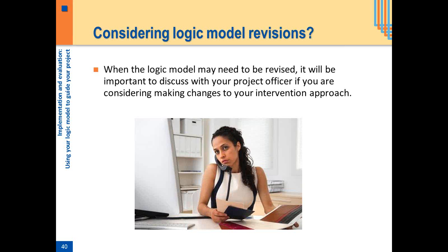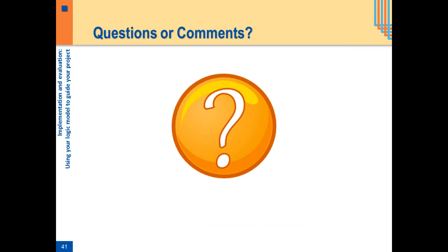And if that's the case, indeed, your logic model should match your intervention delivery, but what we've put on the slide is it's very important to discuss with your project officer if you're thinking about making changes to your intervention approach. So we always advocate that your logic model and your intervention match each other, but if you're going to make a change like this that's different from what you put in your grant application, it's important to talk with the project officer and get approval for that before you start revising your logic model to match it.